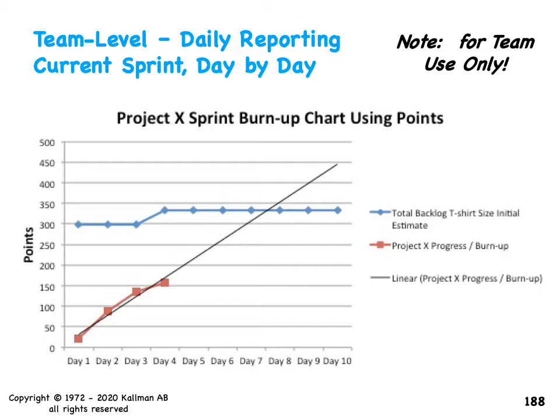And since we were using 2-week sprints, we were looking at, okay, what's the daily velocity after like 3-4 days, and the line was predicting that we could potentially end this sprint 2 weeks early, but you could see that the line was actually starting to flatten out. And on this one, it ended up being an S curve, and they delivered right on time.